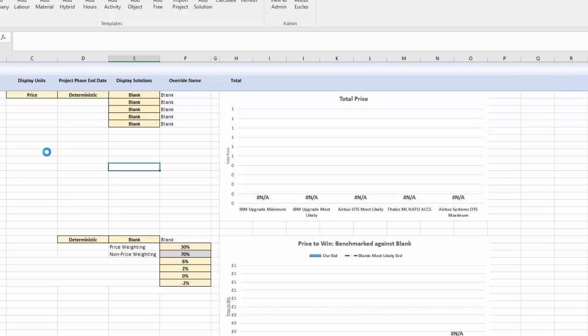If you've done a model that's done any kind of complex project, you're not going to be 100% certain about every single estimate in that model. But if your result turns out to be reasonably accurate after your organization's delivered the project, then you know that it's good enough to reuse a lot of those assumptions. You know, they're better than pure guesses now because they've had some kind of calibration in the real world.